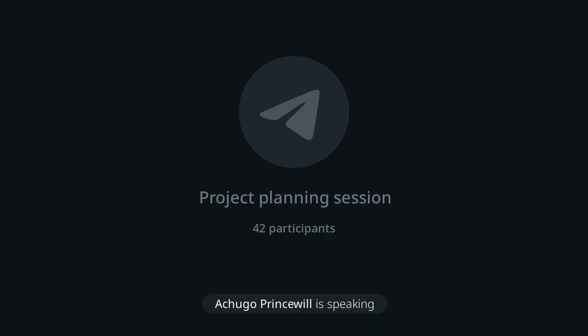Now, did I ask you to do a prioritization framework? Yes. So that is why I asked you to prioritize what is on your list when you use your MoSCoW framework. The 3 features you prioritize are what you are building. So that is what should be on your roadmap. Now you can add all your 1 million features, put it on your backlog, and then your roadmap that is spanning these 3 months will bear the actual features you've prioritized that will be worked on for this 3 months duration.